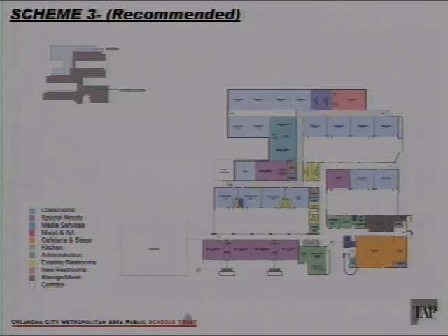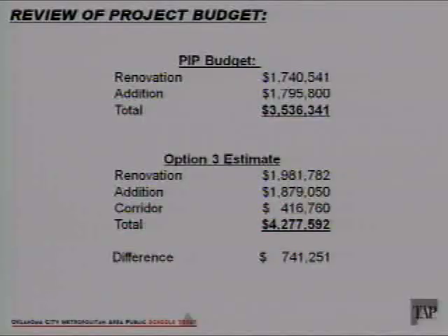But this exceeds what we were mentioning on the educational specifications, which is one of the contributing factors to it being over cost. And I'd like to add, it was 2 classrooms programmed for this size facility that were about the size of 1.5 of those existing classrooms. But because of this special equipment and everything, there's no way for them to shrink those down. And still, they have apparatus hanging from the ceilings and training equipment, rehab equipment in there.